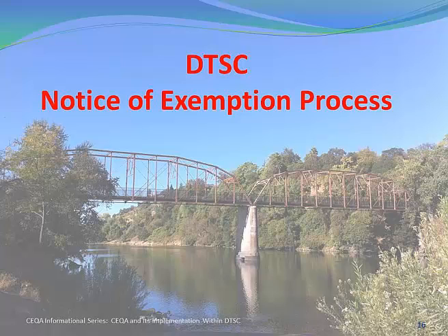Oh, and I'll just follow up and say that it's going to take some sort of environmental analysis in order to do that. An initial study naturally is the logical place to look, but we don't necessarily have to do a full-blown initial study, capital I, capital S, with all of the procedural requirements that go along with an initial study.